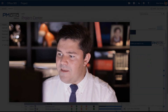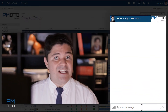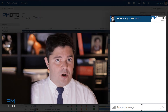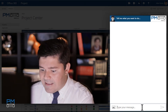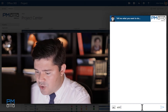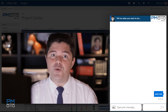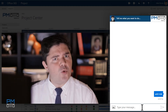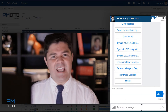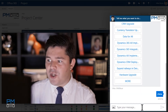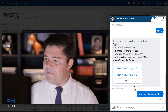Let's start from the web chat. The first thing you need to do is get in the context of the project by asking 'show my project status', or you can just add a risk. Otto will ask which project you would like to add this risk to, and you can search for a key phrase. That's my new manufacturing China project.